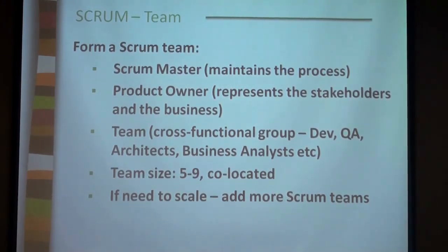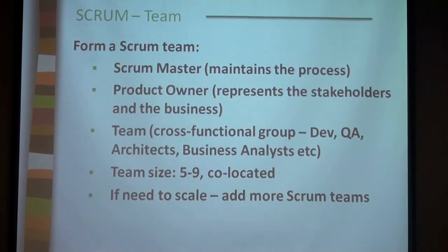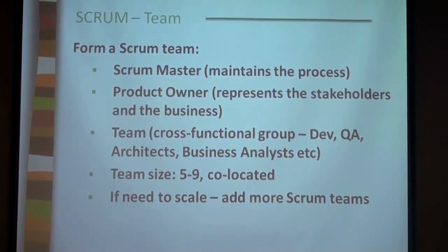Nowadays, people are talking about continuous integration, where you rebuild all your code in one piece, and then someone else tests it. But it depends on the process established in the company. If you don't have the luxury of automation for continuous integration, teams can develop in parallel, and at some point, you may choose to do 1 sprint only for integration. No new features are added. We merge the code from this branch and the code from that branch. We integrate everything, and everyone, development and QA, tests the results of integration. That's the fun moment, believe me.